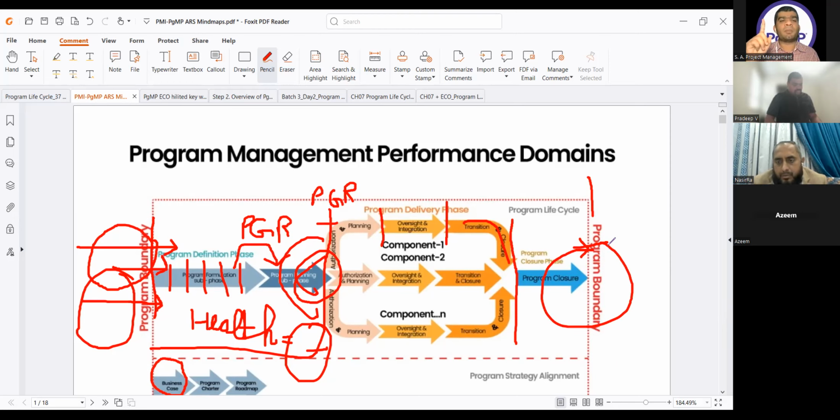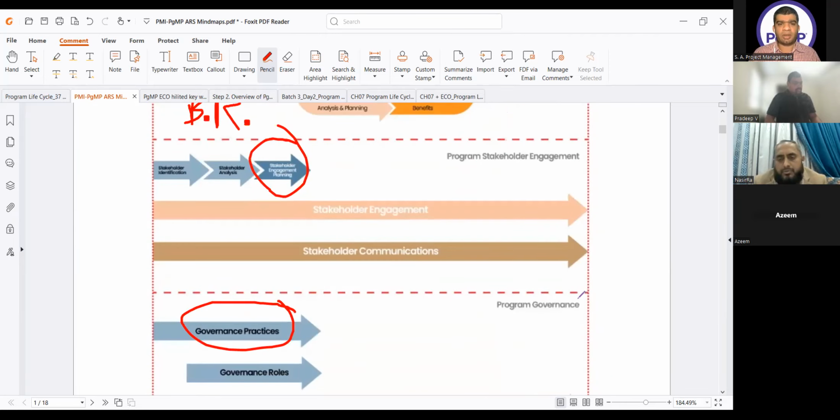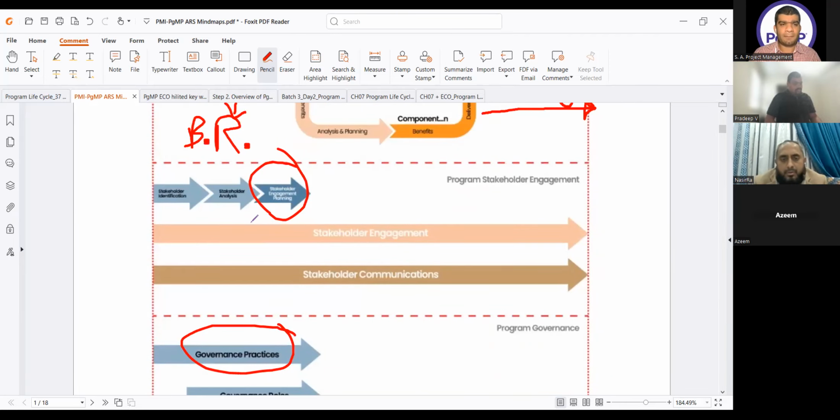If there are any open program risks in the risk register, I will write them in the organizational risk register. And if there is any information at the program level, database, lessons, I will transfer it to the organizational archive and organizational repository. Now explain the stakeholders.